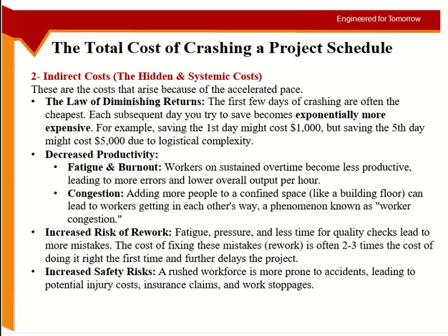Another thing is, let's say you are not asking the same labor to put extra hours. You are saying I will hire new labor. Okay, so I was having 10 people on the site, I need to finish it faster, I'll bring 15 people on the site. Okay, so then you can have a problem of congestion. Okay, congestion not on the road but on the site.